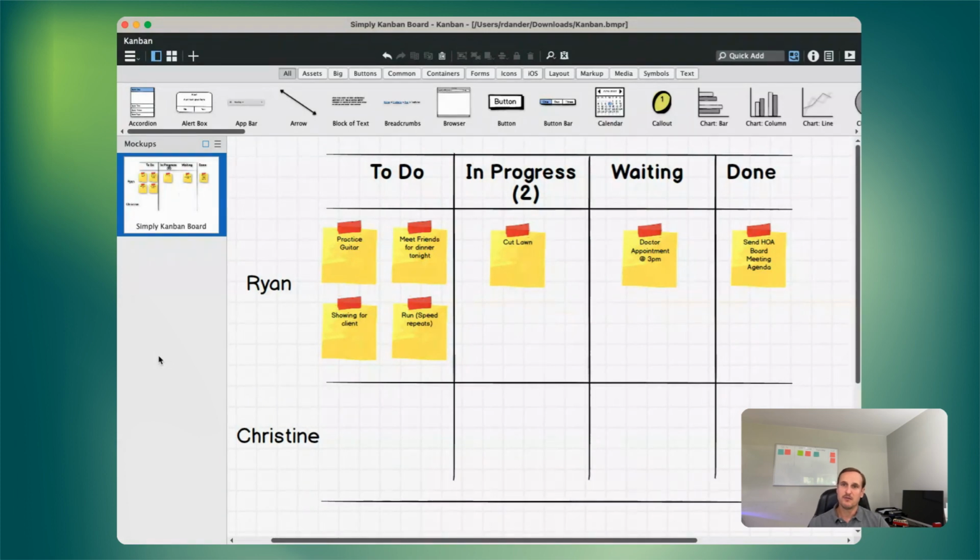Why do you want to use work in progress or WIP limits? So Kanban is really a pull system. It's where you define work, you prioritize work, and then you pull work. So you're pulling work to yourself, or you're pulling work to a team or a business group. And what defining WIP limits does in this case is it really encourages or molds the thought process around completing something before starting your next task or work item.